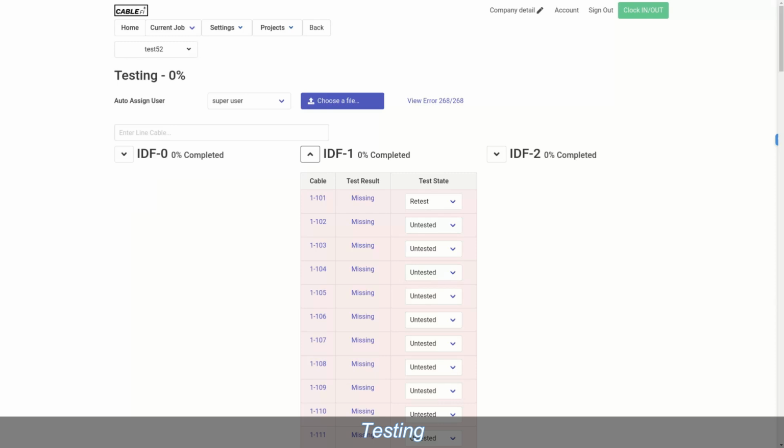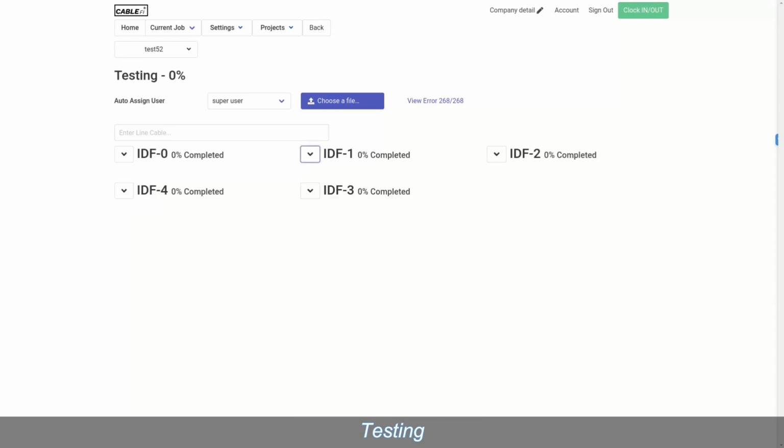This is going to provide your guys with a ton of efficiency, right? I mean, most of the time when you're going to close out a project, testing is usually the last thing that's being done. And if you have technicians that are new, they're green, they're learning, that are doing the terminations, odds are you're going to have quite a few failures if you don't have inline QC with somebody going back behind them before testing to verify that their work is of high quality. So at the very end of a project, you could spend a lot of time testing and retesting.